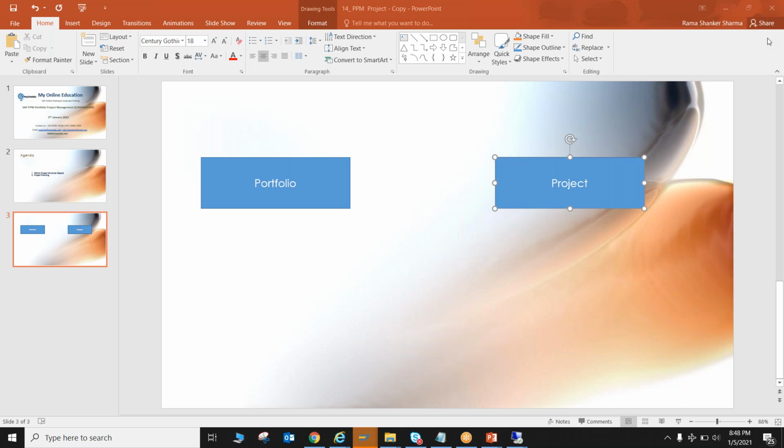When we are replicating the PS project from PPM, the system is using the hard coded PS profile, that is CPR 0001. If you want to make it flexible, you need to go into that particular program and change that combination. You can say, if I'm selecting this project type, this is my profile. A programmer can easily help us in this case. If you need the functions or programs which we are going to implement, I'll help you. I have a list, I'll share it at the end.